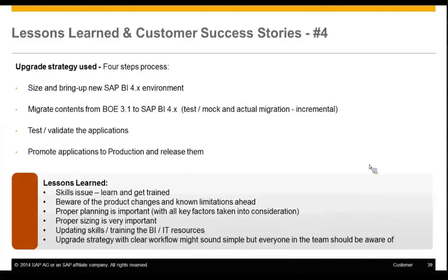And then contents. Because it's a bank, a financial institution, they were very particular about throughput and performance. So they wanted to do a first set of mock runs before deciding on the actual size of the migration, in terms of the number of projects and the objects that they would be putting in the package. And then testing to validate the application before releasing it. Again, they spent an enormous amount of time in testing and validation.